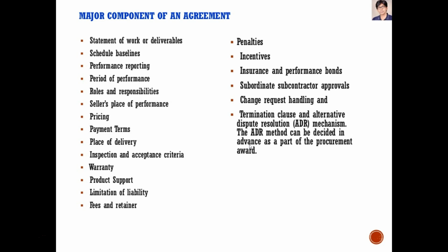When you build a house, for example, there are preset stages where that contractor gets paid, and a lot of times in other construction projects. When the house frame is done, they get a chunk of money. When it's what they call dried in, in other words the roof and the siding and everything are on it, you get paid. When the drywall and the interior finishes are done, you get paid. So there's a payment scheme in place.